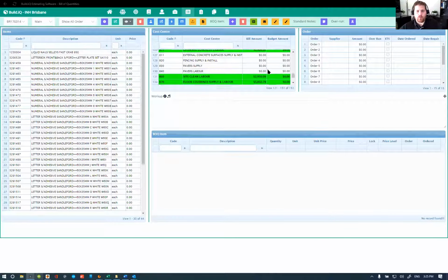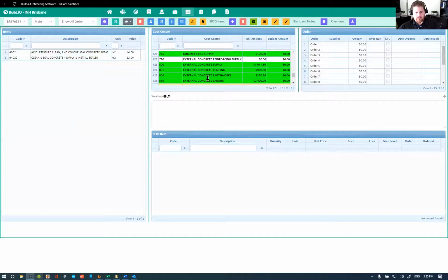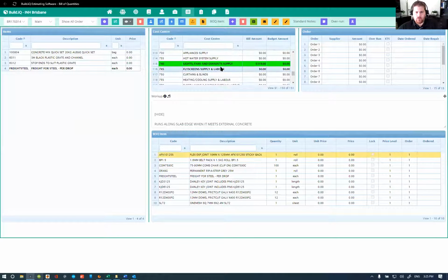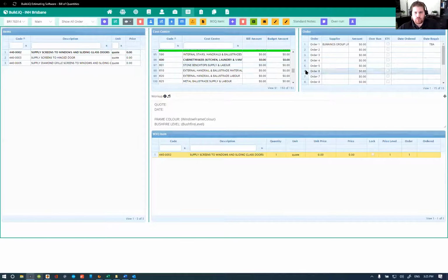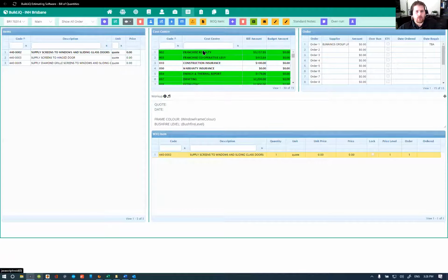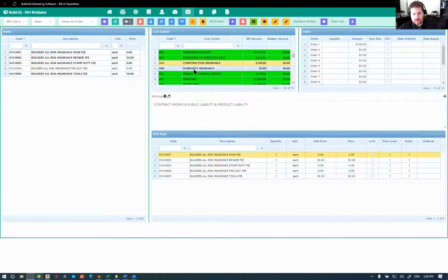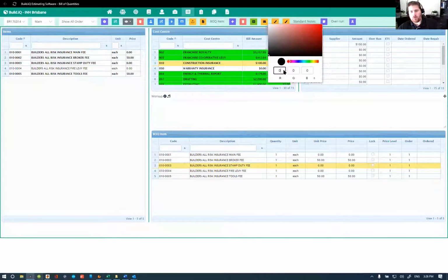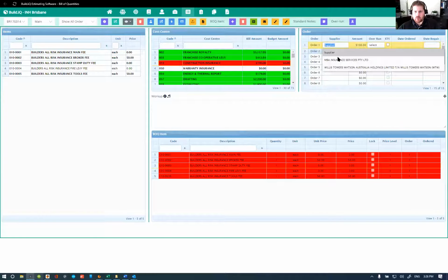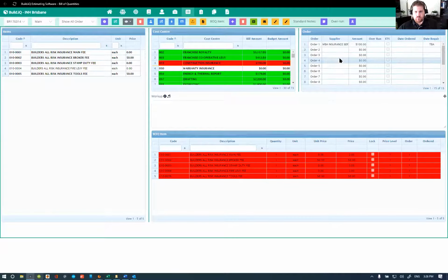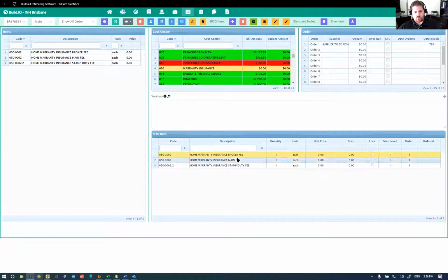So carrying on from where we were earlier, we were going through the iEstimate, triple checking all the values that were in here currently, and just adding the items necessary. Now, this here, for example, I'm just going to mark in red for the time being. The warranty insurance, now there's no brokerage fee in Queensland, so we can likely remove that component from the standard explosion.